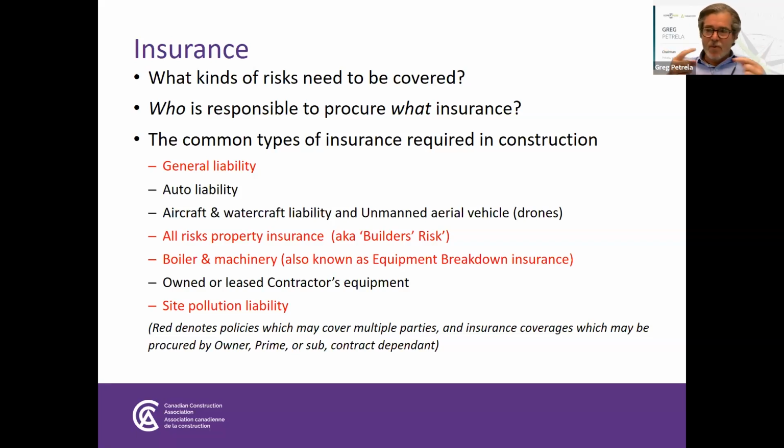So there's no finger pointing as far as whose liability it was that caused the damage. And we know definitively, we don't have to follow up every year to make sure the subcontractors renew their insurance on this project. We just know that this particular project has a policy designed to cover all parties on one project. And that's why that particular policy is called a wrap-up liability policy.